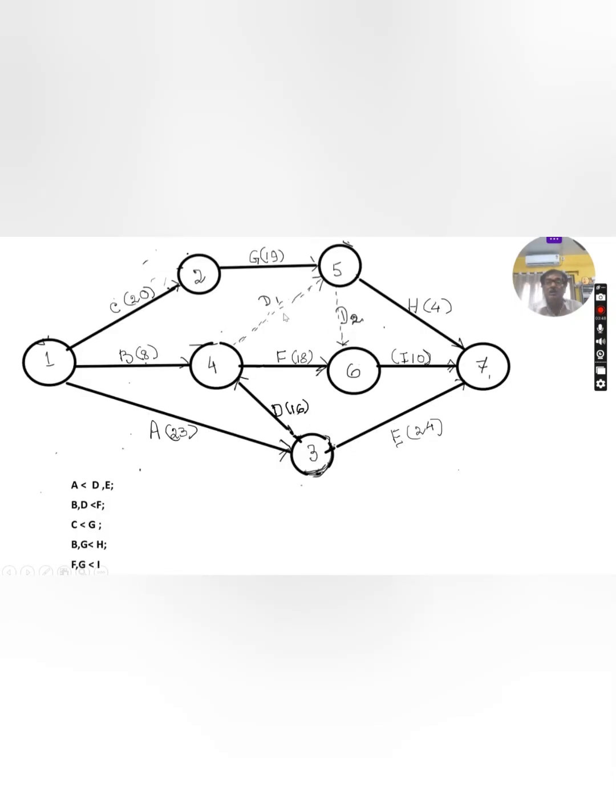But D1 and D2 are dummy, which I have already discussed in my previous video. These are used only for representing the predecessor relationship. This activity will not consume any resources or time. The time for this activity is 0. The actual relationship is represented with the help of this.